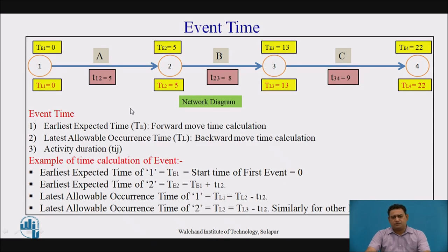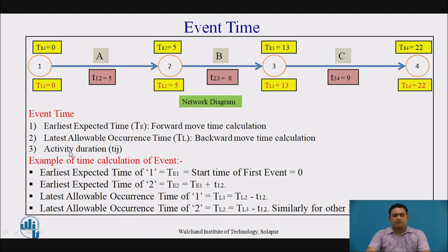The event times: the yellow color boxes represent the event times. The first is the earliest expected time TE, calculated by moving forward from left to right. The latest allowable occurrence time TL is mentioned below the nodes and is calculated by moving from right to left.